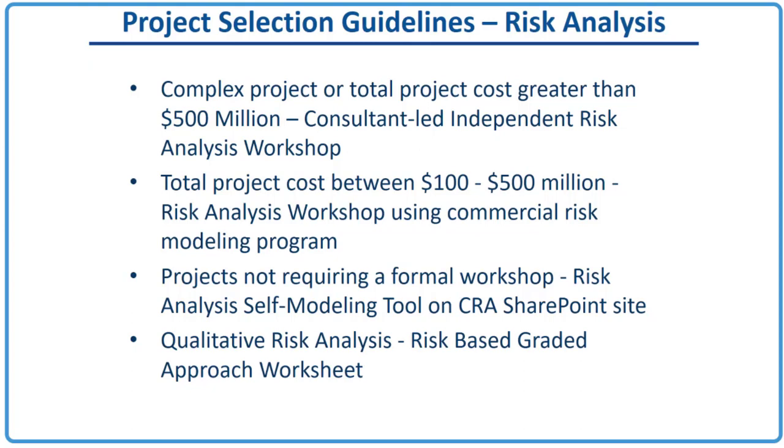Any total project cost greater than 100 million, but less than 500 million, also requires a risk analysis workshop using a commercial risk modeling tool, but a consultant-led workshop is optional. Some of these workshops can be led by in-house staff.